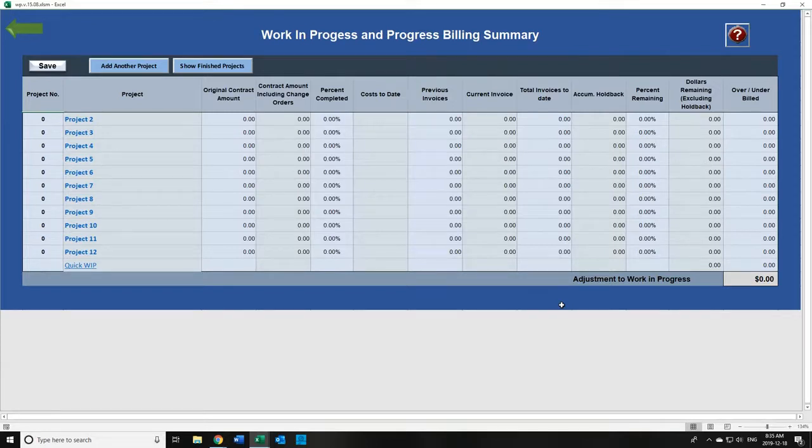So you need to be in control of it. Don't rely on your accountant. Your accountants at most times don't know how to do this calculation, and you'll end up paying tax on money you didn't earn. So take control of the situation by providing the accountant with the adjustment number right here. Okay, we're done.